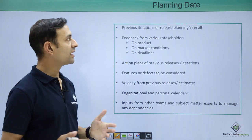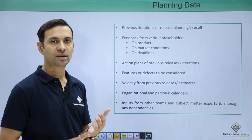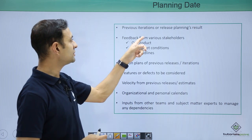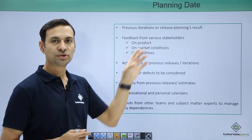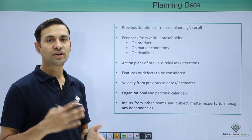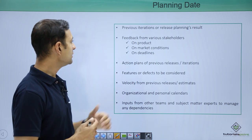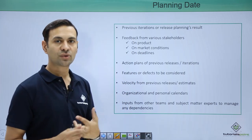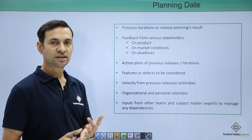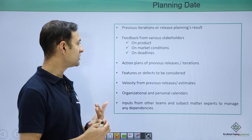The planning date has to be established almost two months before. Previous iteration and release planning results should be stored so that we can see what was done, what was not done, and what the action items were. We should also take feedback from various stakeholders — the product owner, market clients, market conditions, and deadlines.